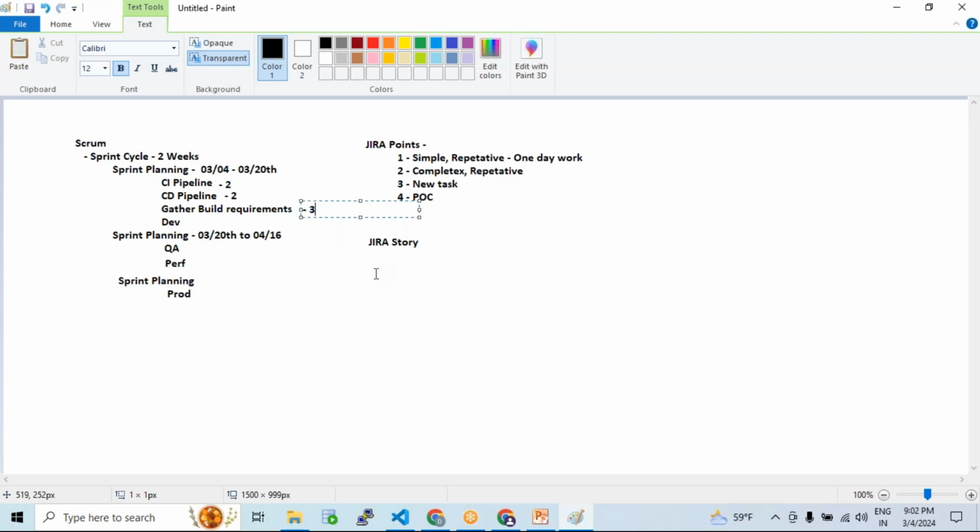If you ask me now, what will be our daily activities in real time? What is your daily activity now, guys? In general, the sprint will start on one day, and that sprint will go on for 2 weeks. Your goal is, on day one when the sprint starts, to plan your stories for the next 2 weeks, how you need to work on each story, and ensure that the stories are getting completed. Every day you look into your sprint board. This is one more terminology, Jira board.